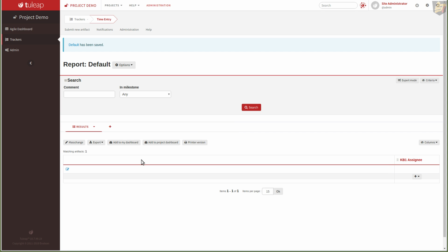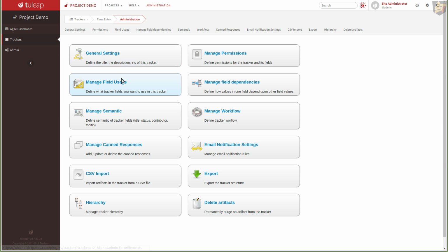But as something gets finished off and someone submits their time, they may submit it 3 weeks later or 4 weeks later. This is unacceptable, and I'm talking about independent consultants submitting their time back to you at such a later date. How do you bill a client for something that took place 2 months ago? They just don't know what took place 2 months ago.